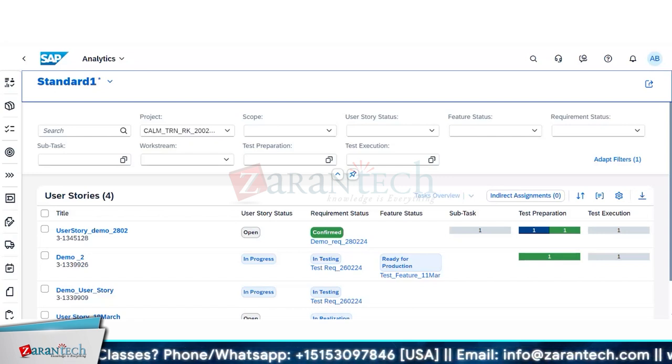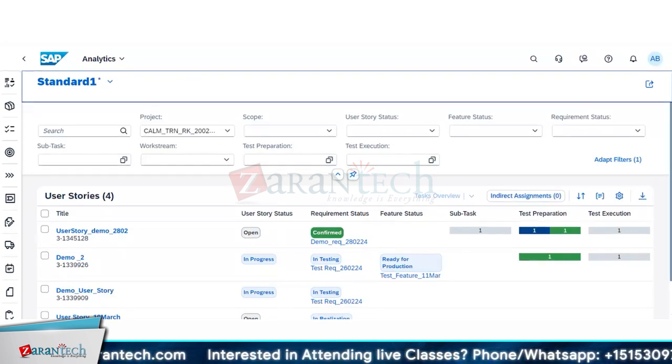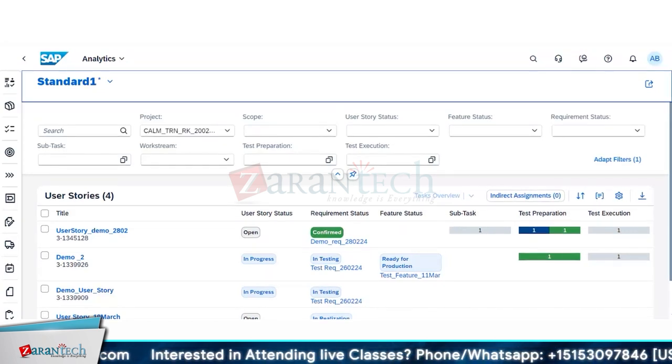There's no other change. No development required, we are not going to develop or customize anything. So fine, we don't go with a feature, or we just create a requirement to document that we are going with the standard, and then create a project task for the work, right? Because somewhere there is some effort, right? Even if it's minimal, there would be some effort, even if it's 1 hour or 30 minutes, or there will be multiple teams.